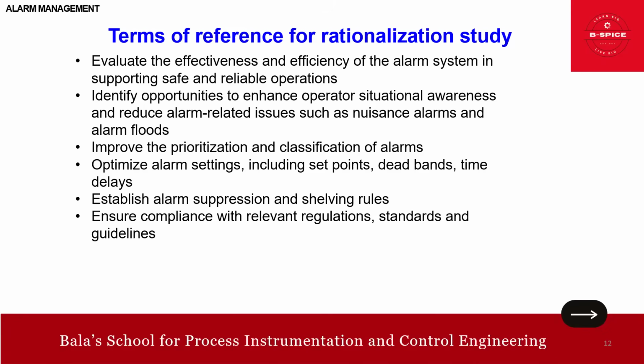The alarm rationalization study will result in the deliverables. You have to list what all the deliverables are. We have talked earlier. All those deliverables you need to list out here in the terms of reference. And also the time frame, with regular progress updates provided to the stakeholders throughout the process, all has to be there.